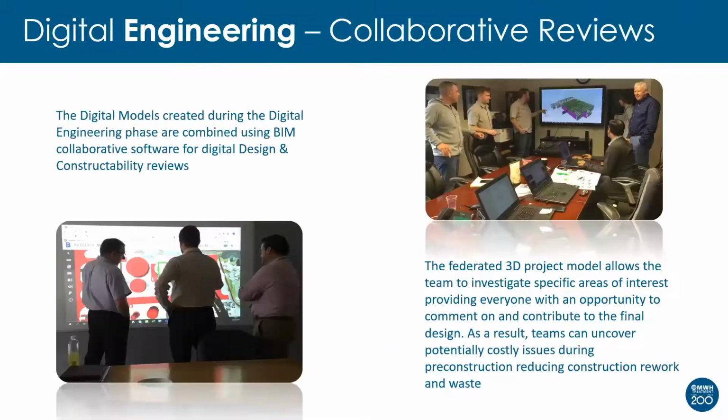So collaborative reviews, again, not a tool, but a technique. And this, a couple of examples there of workshops that we've held, and with the ability to visualize what we're doing, it just brings the whole team together. So we can look at potential issues, potential problems, and we absolutely have uncovered some potential costly issues on our projects by undertaking these collaborative reviews at an early stage.